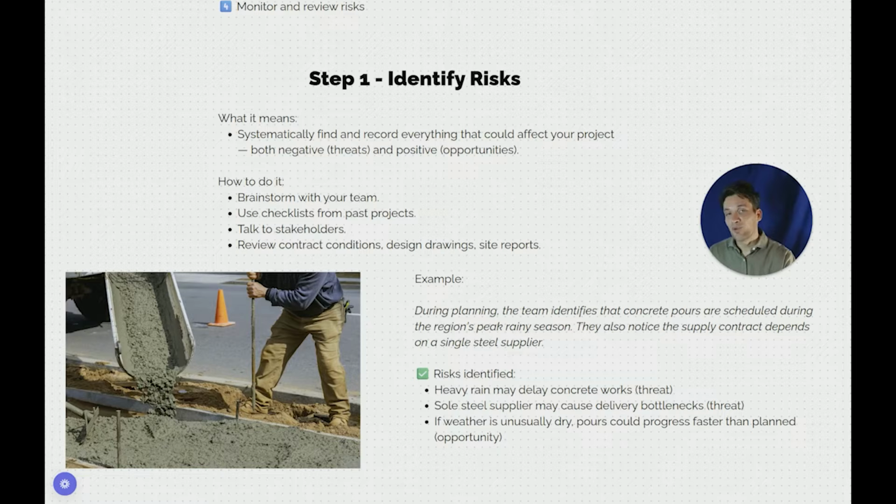Now, this is broken down into event risk, but you could also categorize this as a variability risk, where we've got a set assumption of how much inclement weather we think there's going to be, and that assumption may be lower or higher than what we predicted.